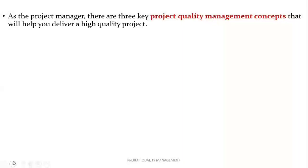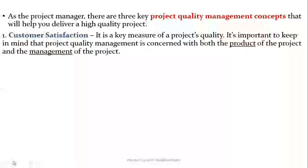As the project manager, there are three key project quality management concepts that will help you deliver a high quality project. First is customer satisfaction. It is a key measure of project quality, and it's important to keep in mind that project quality management is concerned with both the product of the project and the management of the project. If the customer doesn't feel the product meets their needs, or if the way the project was run didn't meet their expectations, then the customer is very likely to consider that the project quality is poor. So managing customer expectations is also a critical activity that you need to handle well for your project to succeed.